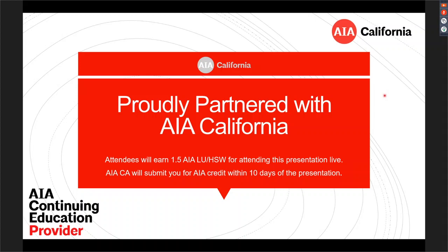Approved with comment should also be that simple. It's not always going to be the case. There's going to be an exception where an ACD is required. But the fact that they reviewed it and they're asking for additional information, but it's not significant enough to require a back check, that in itself should mean it's pretty mild and could be done with an NMA. Again, not always the case, but go on.